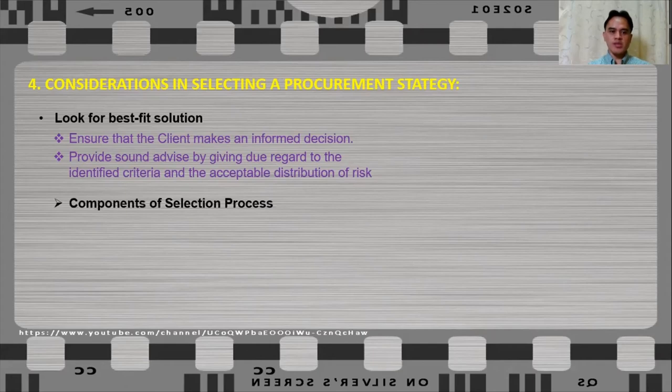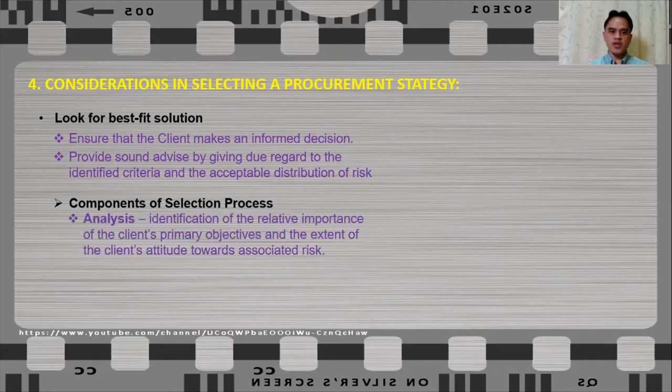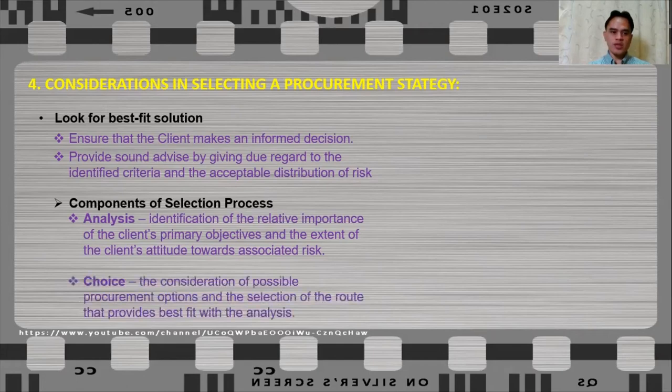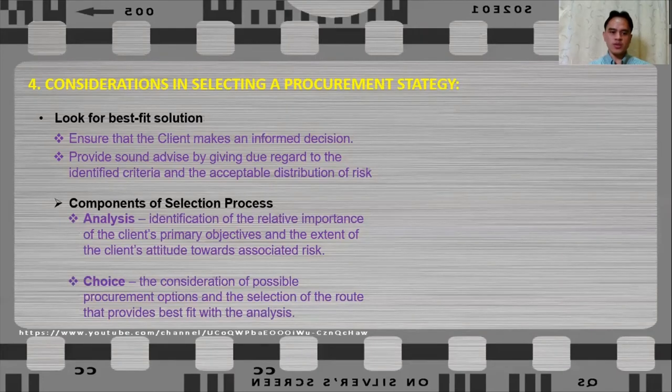Now, in selecting this best fit solution comes with the following components. First is the analysis or the identification of the relative importance of the client's primary objectives and the extent of the client's attitude towards associated risks. The second component is the choice or the consideration of possible procurement options and selection of the route that provides best fit with the analysis.